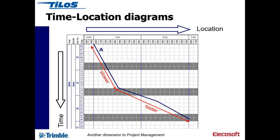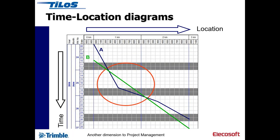Within a single task you can have changes of productivity, which can be displayed on the diagram. If we overlay task B — which starts and ends after task A — because of that change of production, you get a problem: two activities taking place at the same time in the same space. Two crews have bumped into each other, two machines have crashed, two trains potentially. TILOS has unique features to avoid that situation in a way you couldn't do in any traditional planning software.